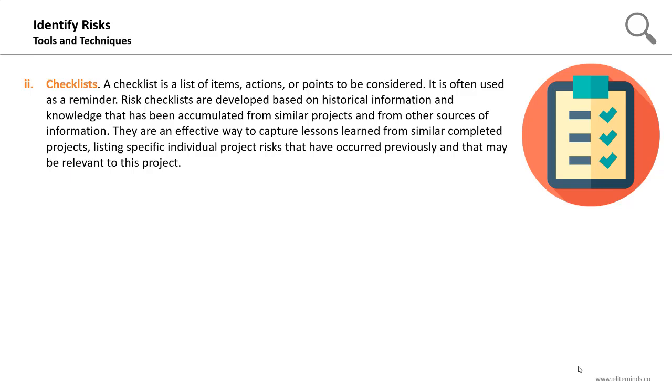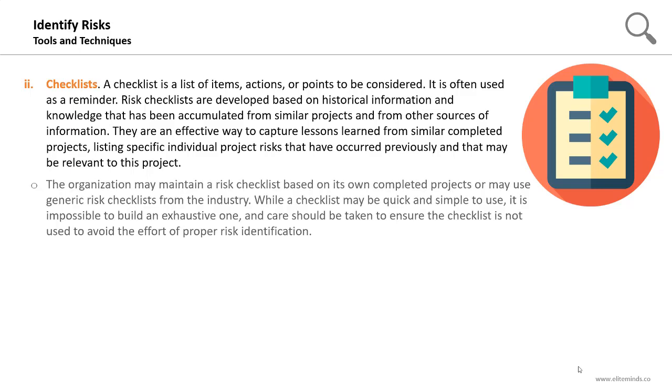They can be an effective way to capture lessons learned from similar completed projects, listing specific individual project risks that have occurred previously and that may be relevant to your project. So checklists cannot be used as a standalone technique or tool. It is usually used as a reminder.